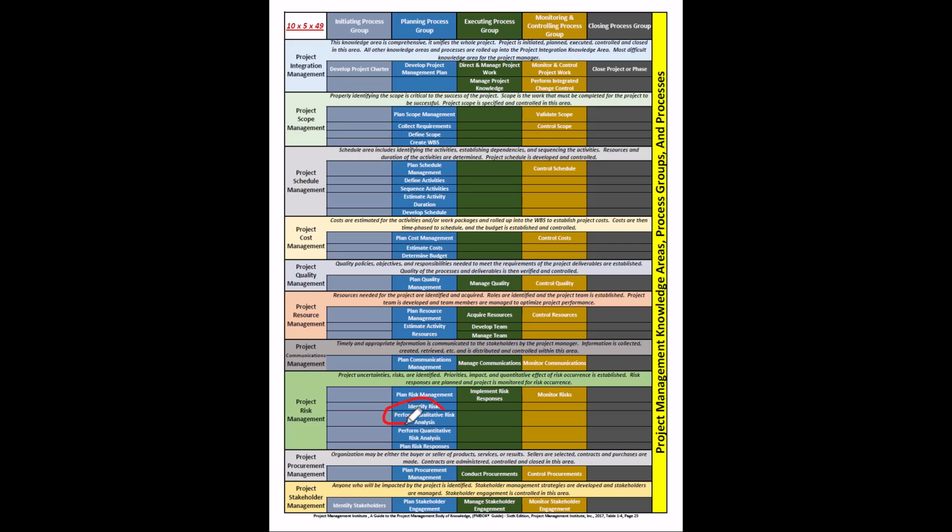And when we do the risk assessment, we will do the most likely or likely to occur, more likely to occur, and so forth. And we would establish, first of all, the probability of occurring. And usually we would do that on a low, medium, and high category. We would also estimate the impact, low, medium, and high. Strictly subjective, it's done very quickly, and it gives us a priority. So it kind of introduces us to the risk, really.